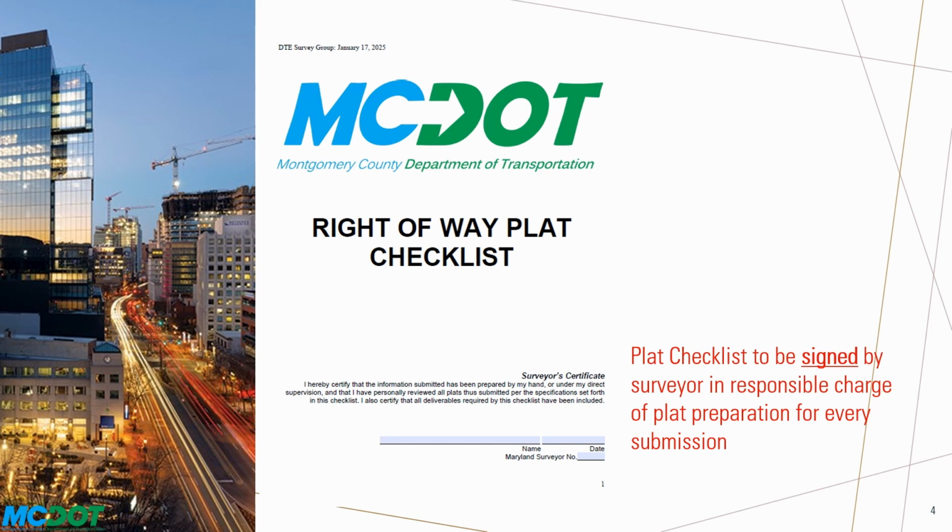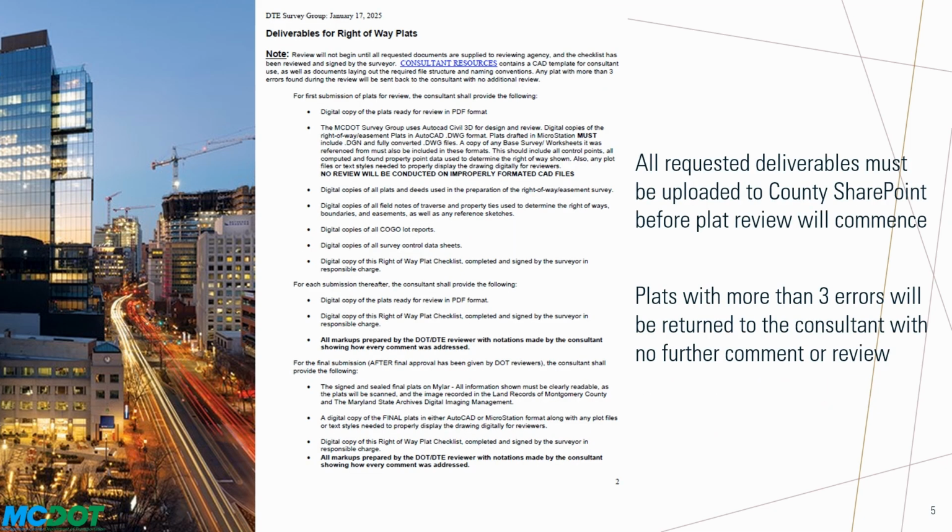This certification will ensure that the surveyor in charge has either personally reviewed the checklist or has assigned internal quality control to someone by personally signing off on the certificate on the first page of the checklist included in every submittal. We have also developed an internal SharePoint site where all property acquisition related material is stored and disseminated.